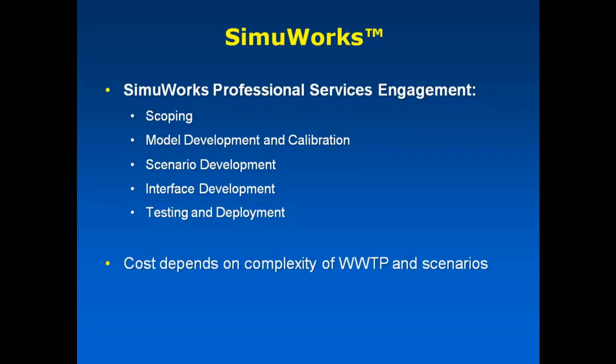So the cost of developing a SimuWorks interface is a function of the complexity of not only the wastewater treatment plant, whether it's two systems in series or whether you've got digesters involved or not, but also the scenarios themselves. You have two different storms, or how many different types of scenarios do you want to run? So our experience on the projects that we've been doing over the years is that a single plant of a typical complexity might range between $30,000 and $75,000, depending on the complexity of those scenarios and the model.